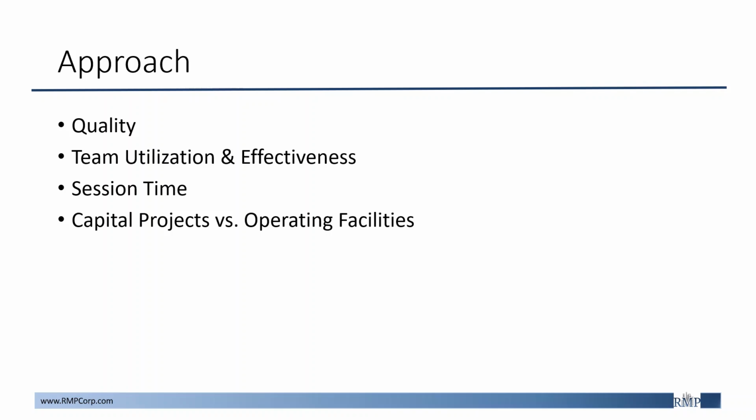It is also important to understand the type of study being performed, whether that is for a capital project or an operating facility. So for capital projects, they typically have fundamental design vulnerabilities that the HAZOP/LOPA is being used to help resolve. Oftentimes, these projects have larger multidisciplinary teams with numerous stakeholders who wish to participate, some of which may be widely spread geographically. Additionally, these projects tend to encounter significant financial pressures to accelerate project schedule, but also have significant financial impacts associated with design mistakes not caught during the HAZOP, which could in fact lead to challenges later on in the design process.